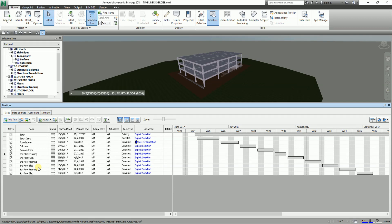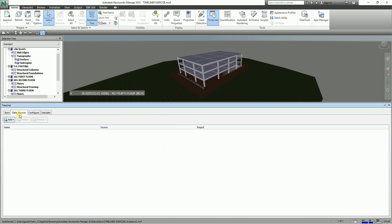So to do that all you have to do is you just need to go to the Data Sources tab. From here you can add - so this step enables us to import tasks from a third-party scheduling software, like for example Microsoft Project and Primavera.